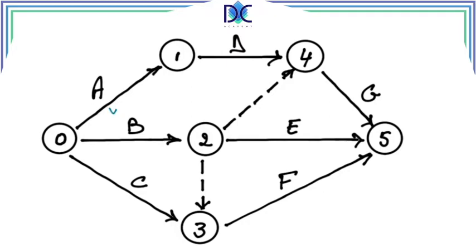The first thing we're going to do is to add the information about the duration and the standard deviation. The first number is the duration for A, 4.5, and there is a standard deviation of 1.5. For B, we find a duration of 2.3 with a standard deviation of 0.5, and for C, a duration of 1 with no standard deviation, standard deviation 0.